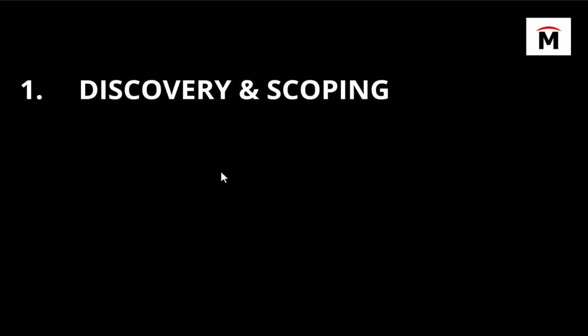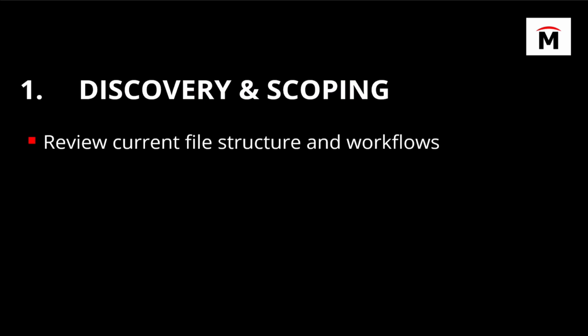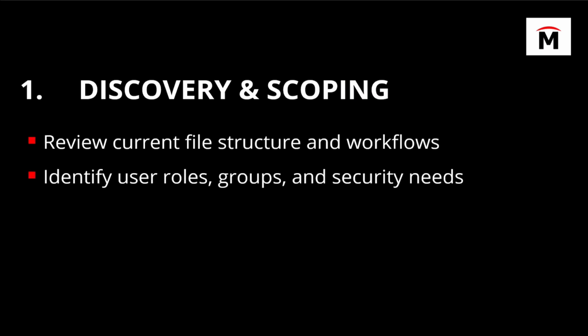MLC uses a 5-step process to effectively help our customers implement, use, and find success with their data management tool. The first step in that is what we call discovery or scoping. What we do in this step is review with our clients and customers their current file structure and their workflows. Essentially, what are you doing today? This helps us identify the key users, the roles, the groups, and what your security needs are in the new system.